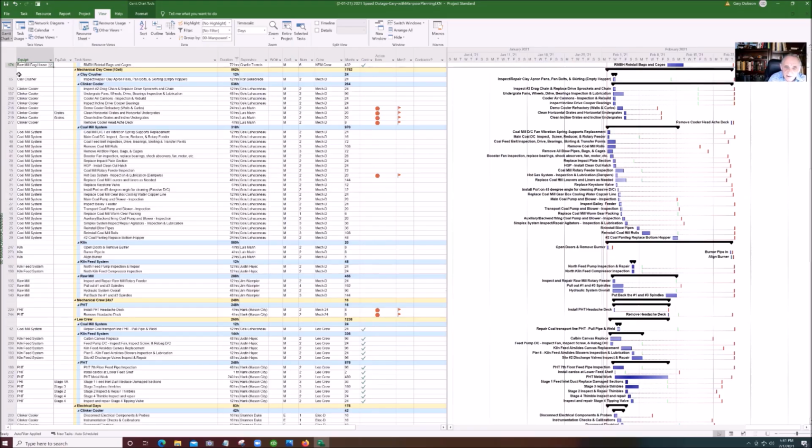It also has one of the number fields set up so that the duration of the task times the number of men used on that will give us the man hours. So a 12-hour job that uses 2 people is going to be 24 man hours. That's all calculated automatically. Within our grouping, it's automatically going to total within the group totals. So we have totals for the equipment, number of man hours in each piece of equipment, for the mechanical day crew, and of course the total man hours for the day crew mechanical for the outage.